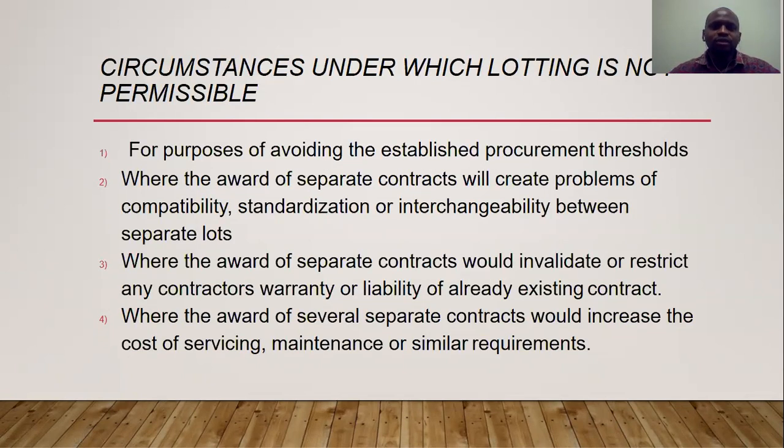So what are some of the circumstances that are very critical when lotting is not permissible? Number one, if the purpose is to avoid establishing a procurement threshold, then you are not required to use lotting. Number two, where the award of separate contracts will create problems of compatibility, standardization, interchangeability between separate lots. So if it is going to bring confusion or compatibility issues or standardization or interchangeability, then you're not supposed to